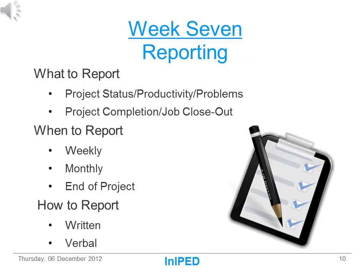Week 7: Reporting. Reporting is another important responsibility for the PEL. There are many different types of reports — some required by the project only, some by the piping department manager, and some by both. The most important issue to report is status: defining where the group should be now versus where they actually are. Some projects may also require productivity to be included in the status report.